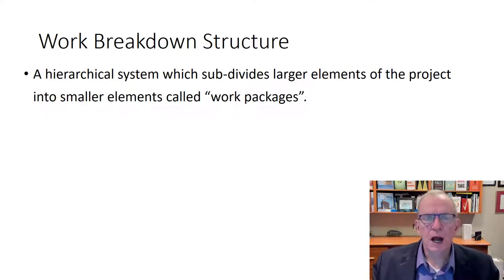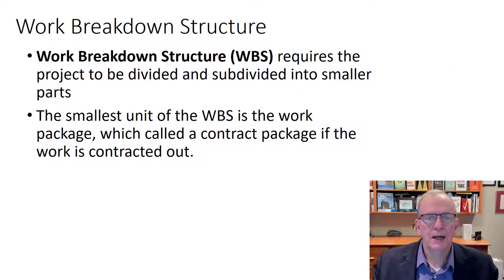So it's really a hierarchical, organizational structure that goes from larger elements to smaller and smaller until you're at the lowest level and you have work packages which you can hold accountable and assign costs to directly, that you can scan at a granular level to see how you're doing based on your budget plan compared to your actual costs. So that's another strong reason why we want to use a work breakdown structure.